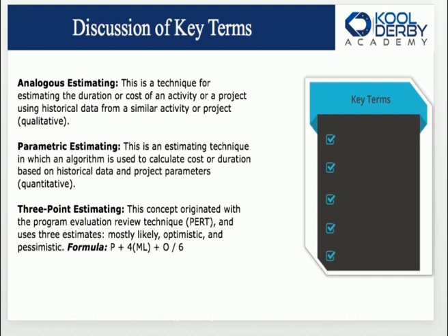Why? Because this person or this estimate is coming from someone who does the work most of the time, or who has a pretty good idea. Can it be the same person giving you the estimate? The answer is yes. But you want to get these 3 estimates because it increases the chances of you getting the duration correct. You feed this, you do the calculation, and you put the number right into the activity. Based on this, you might come up with 21 weeks or 4 weeks, whatever it might be. It is a weighted average.